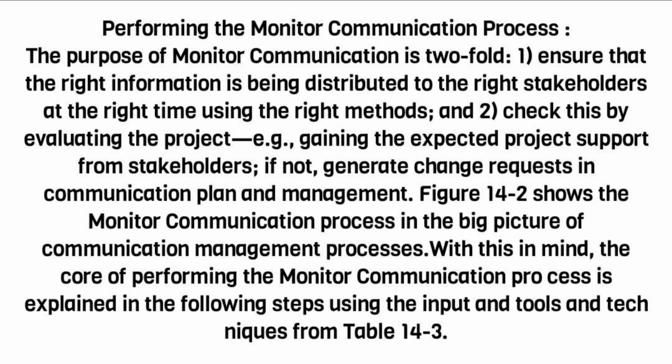Performing the monitor communication process. The purpose of monitor communication is twofold. 1. Ensure that the right information is being distributed to the right stakeholders at the right time using the right methods. And 2. Check this by evaluating the project, e.g., gaining the expected project support from stakeholders. If not, generate change requests in communication plan and management.